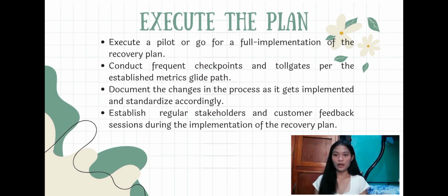Execute the plan. First, execute a pilot or go for a full implementation of the recovery plan. So, try out the recovery plan on a small scale first, or apply it fully if ready. This helps to test if the plan really works before rolling it out everywhere. Next is conduct frequent checkpoints and toll gates per an established metrics glide path. So have regular meetings or checkpoints to see if things are going as planned, and compare results to the goals or metrics you already set.